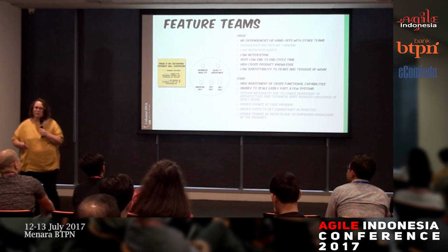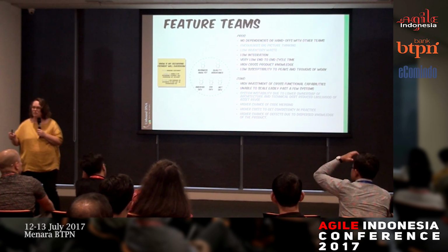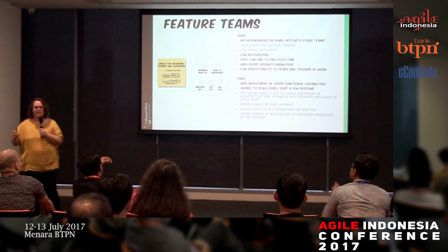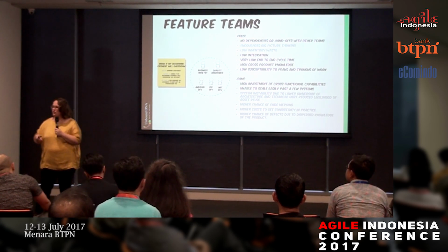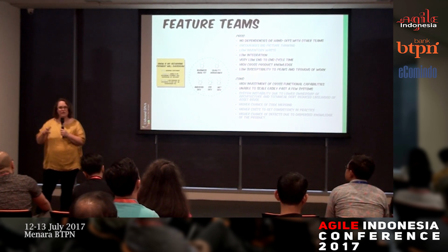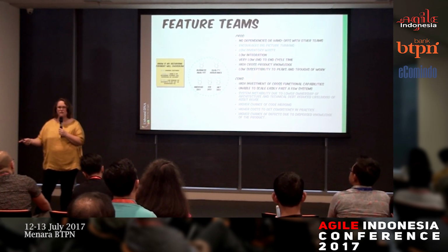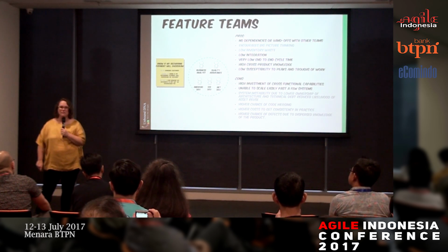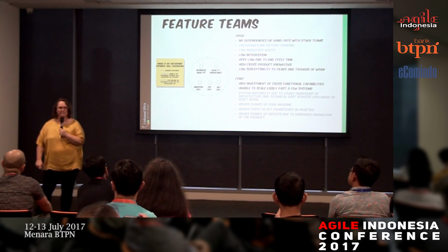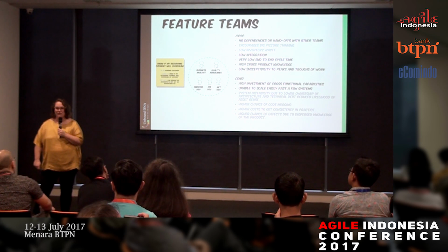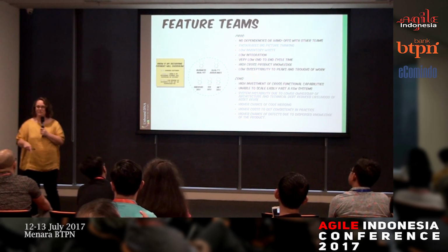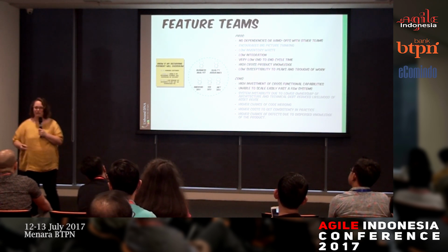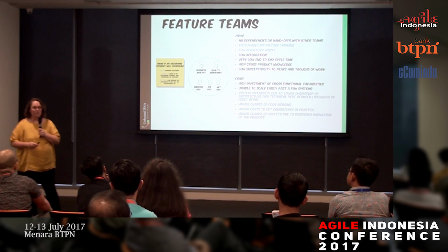Unfortunately, the con is that you probably need to have more cross-functional capabilities inside of the team, and that takes some time to grow. So in the example that I provided earlier, in the situation where I went from 2 teams to 16 teams, what I missed out was the fact that one of those teams was an iOS team and one of them was an Android team. And so one of the first things that I did was say, no, we need to actually have an iOS and Android person in the same team. And there was a lot of kerfuffle, but they did it and it worked.